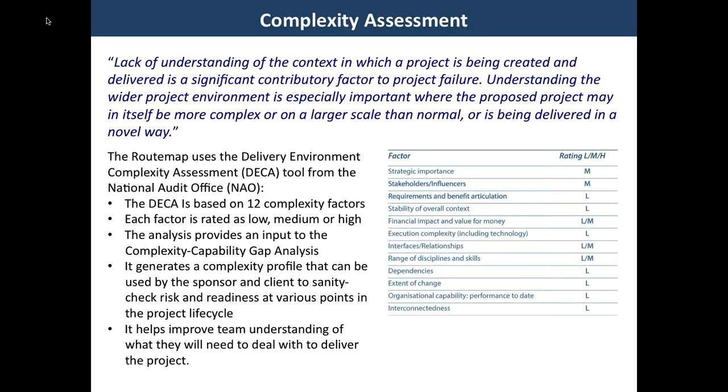The stability of the overall context. Is there a high or low risk of change? Financial impact and value for money. Does the project represent a significant investment to the organization? Execution complexity. Are there new or untested business practices or technology? Interfaces and relationships. Does the project span many boundaries? Range of discipline and skills. Is there a potential to strain the supply chain? The dependencies. Is the project critical to the delivery of other projects? The extent of change. Does it represent business as usual, or does it represent significant organizational change?